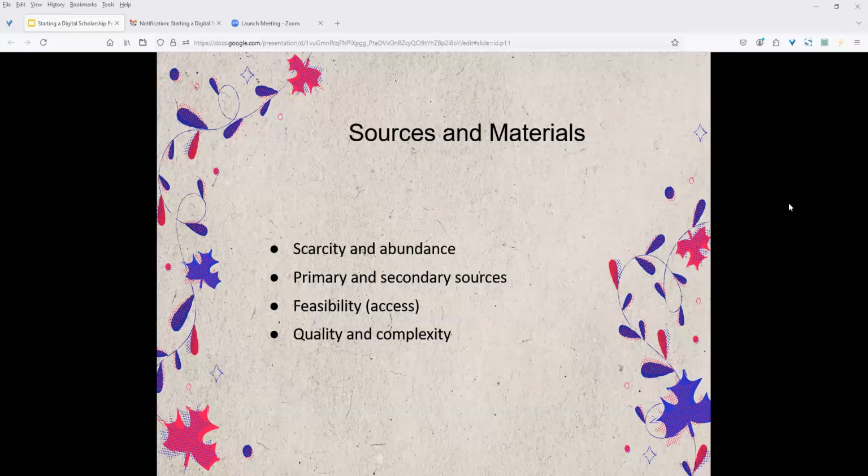So what are the best sources? What are the sources that are available to you? For example, a text analysis project: do you have access to scanners? Are they OCR capable? How about the text? You have the actual text. How many texts? For example, I had one student who wanted to scan 100 books for a project for a semester. It's not feasible. Questions I'll ask for that: who's doing the scanning? What about the copyright issues involved? Where's the final scanned data set going to be permanently held? Do you understand that you cannot give it out to everyone, that sort of thing?